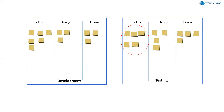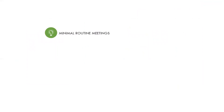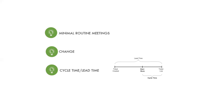Kanban is an Agile model, though it is not necessarily iterative. The Kanban team doesn't mandate formal meetings, though they do plan for prioritized user stories to be released, and the team recognizes the need for such meetings as appropriate. For any change during development, the team accommodates the request — since there is no time-boxed delivery, changes can happen anytime. The key metrics are cycle time and lead time. Lead time, also called customer lead time, is the total time from when a ticket was created until it is completed. Cycle time is the total time taken from the start of work on a ticket until it is finished.